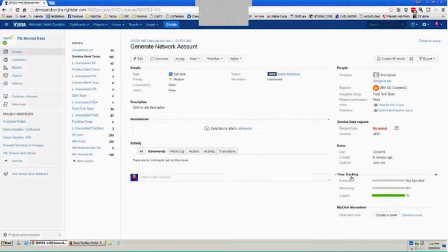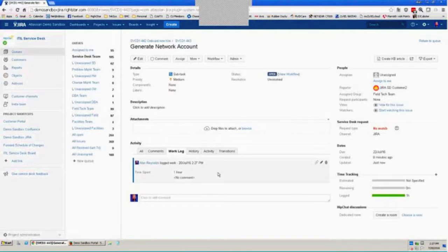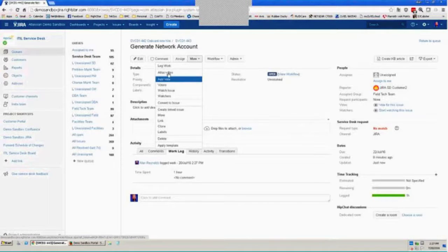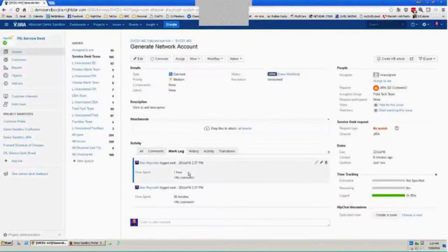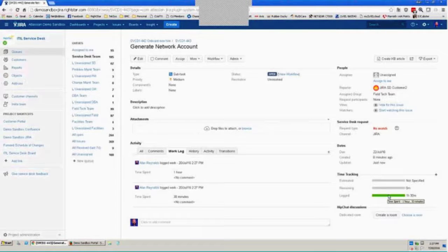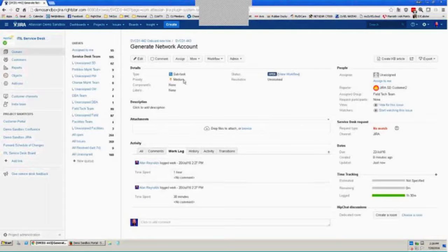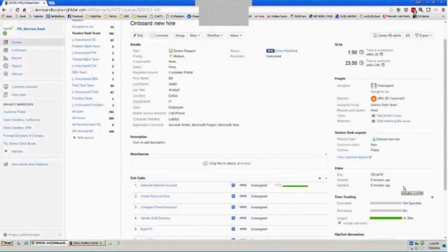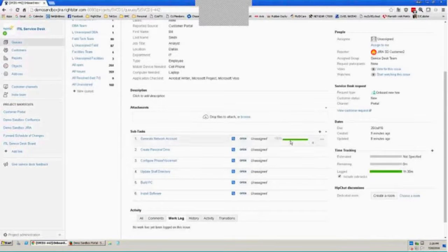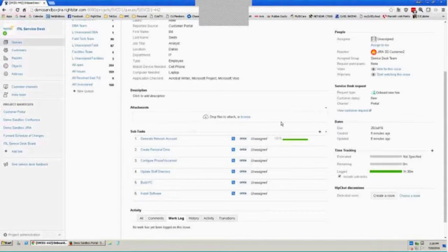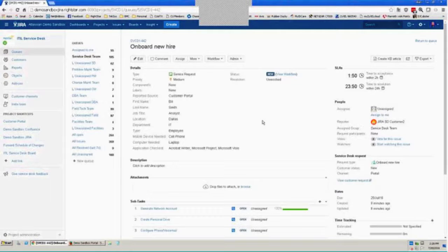And when I do, that work that I've logged shows up in my time tracking section in my sidebar over here, but also appears in my work log down on my work log tab. And should I add a little bit more work? Let's say I spent another half hour on that as well. I have a second entry here in my work log, but all hour and a half of that time that was submitted is logged here in the total area of the subtask. I'm going to pop back up here to my main request and show you that that time is also been, shows up and been logged against the main request. And we see the status of those subtasks as we go that this has had time logged against it.